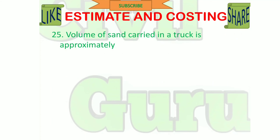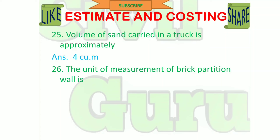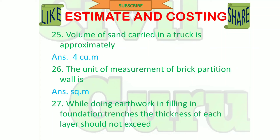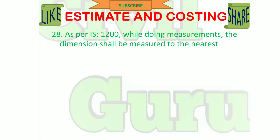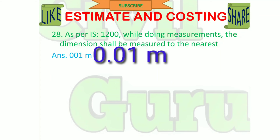Volume of sand carried in a truck is approximately 4 cubic meters. The unit of measurement of brick partition wall is square meters. While doing earthwork in filling in foundation trenches, the thickness of layer should not exceed 20 cm. As per IS 1200, while doing measurements, the dimensions shall be measured to the nearest 0.01 mm.